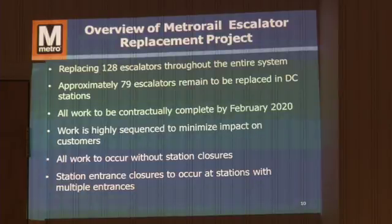But those are in a contingency, because if we don't have that opportunity, that window during that particular evening, then we have to come back and reschedule it again. And that just pushes the schedule out. That's precisely what my thought was, in terms of that conceivably if you wind up with a spate of bad weather, it theoretically could push your scheduling farther back. Right. Well, we're hopeful that we could get the opportunity and all the stars line up and we don't have that problem.